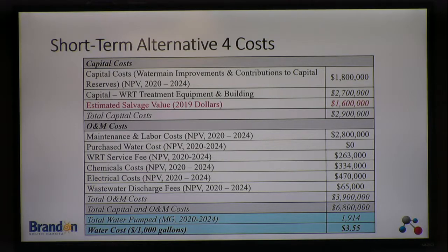Yep. What was the cost on that? The cost for the equipment is $2.7 million for the capital improvement, and that includes the on-site stuff, the building, the equipment, etc. And then there is a cost per thousand of $1.20 per thousand. And that's the cost that you pay them for this periodic replenishment of the media.